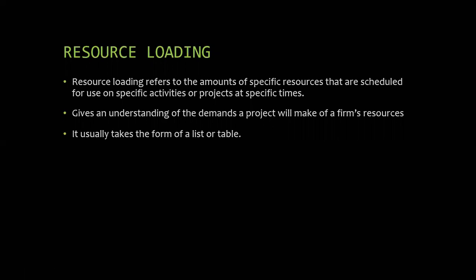What is the cost or the amount? What is the rate of that particular machine? That should be scheduled. So when you are making the schedule of the project, the use of that particular machine should be scheduled at the time of slabbing only. It should not be scheduled at the time of foundation work or other work.